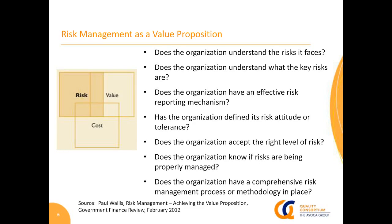However, if it might be an early phase exploratory study that is not critical path to any major decision point, you may be willing to accept risks that you would not have accepted on that phase 3 pivotal critical path registration trial. So you have to understand where the organization is willing to put the risks at any moment in time, and when they will accept them and when they will not.